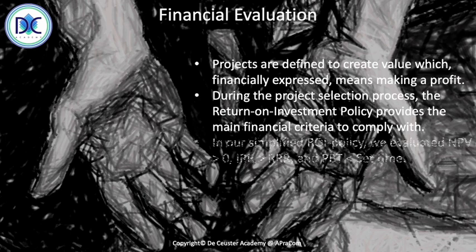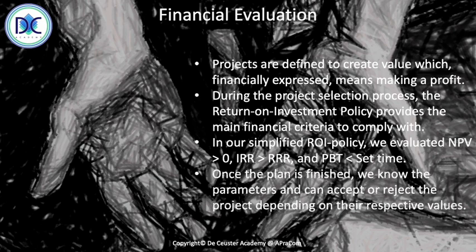In our simplified ROI policy, we evaluated the net present value, which must be larger than 0, the internal rate of return, larger than the RRR or the required rate of return, and the payback time less than a preset time. Once the plan is finished, we know the parameters and we can accept or reject the project depending on their respective values.